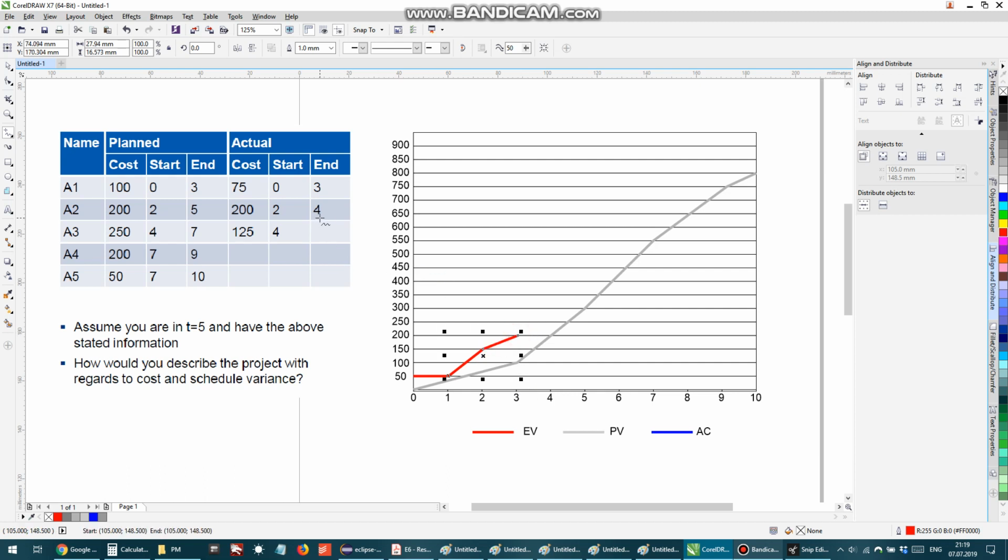Then we move on, and by day 4, I see that we have completed this task here, which means I have to take the rest of it. That's 100. But also, I see that we have started another task. And according to the 50-50% rule, we have to immediately take half of it when we start it. So the remaining half of this one, because the first half we already took, and half of this one.